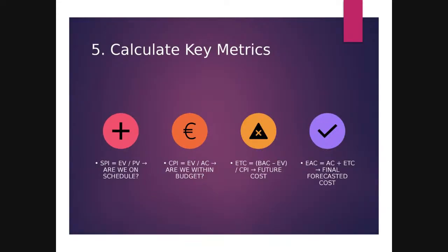And then the next thing is you calculate key metrics, right? SPI, I've shown that to you, right? Are we on schedule? CPI, are we within budget? And ETC, right? What is the future going to be? How much more money are we going to spend? ETC is the metric that is at the center of this discussion.